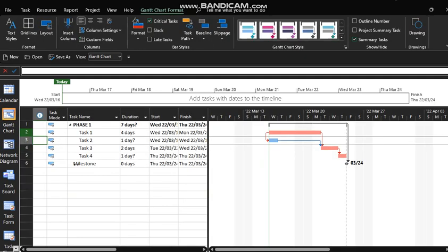Once you've got that concept, then you understand the notion of critical path. And it's very logical anyway, because this one can carry on for 3 days before it becomes a problem. Which means that if that one is a problem and there are resource issues with that one, you can borrow resources from this one to put onto that one, thus keeping your project intact. Okay, all right. Therein lies the logic.